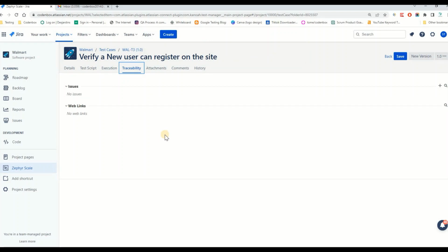Traceability matrix, this is a separate topic, but a traceability matrix is nothing but it helps you to map or verify the test coverage versus story. Make sure that for each and every story, you have at least one test case, so it gives you the test coverage scenario. It shows the map between the stories and test cases, right? So that's how the traceability matrix helps you. It helps you to trace your stories to ensure that your stories have test coverage.